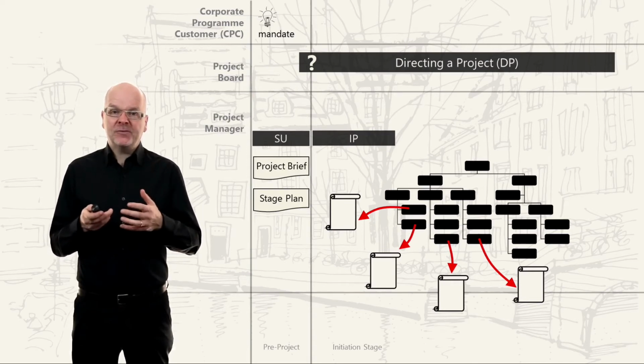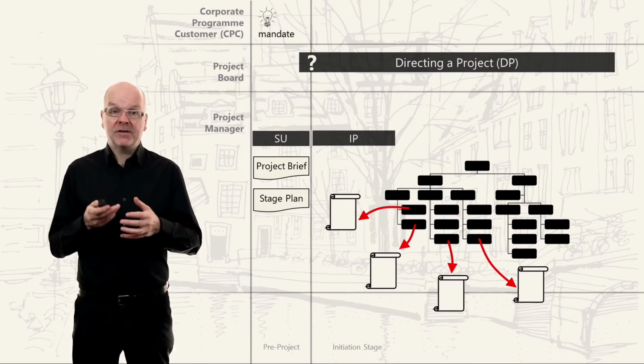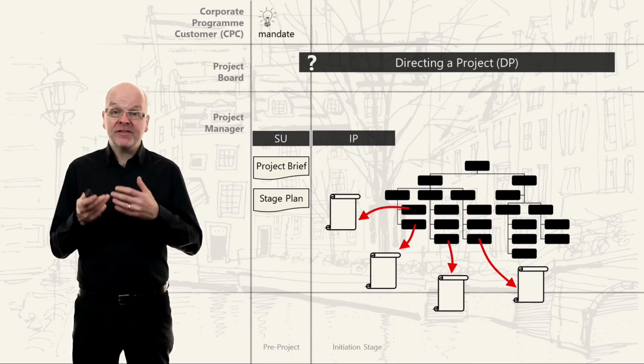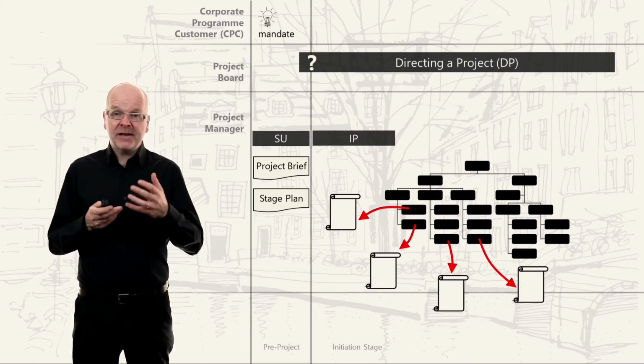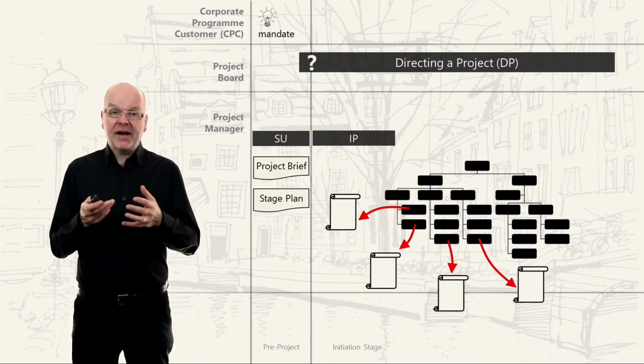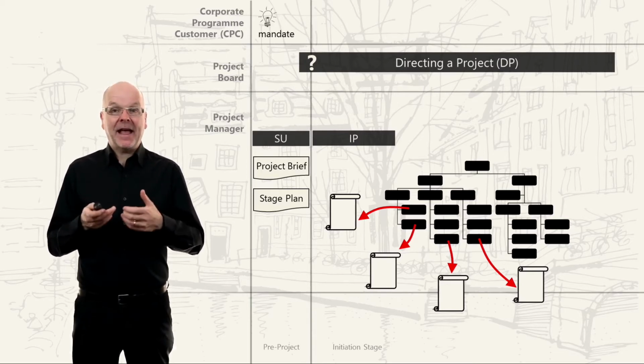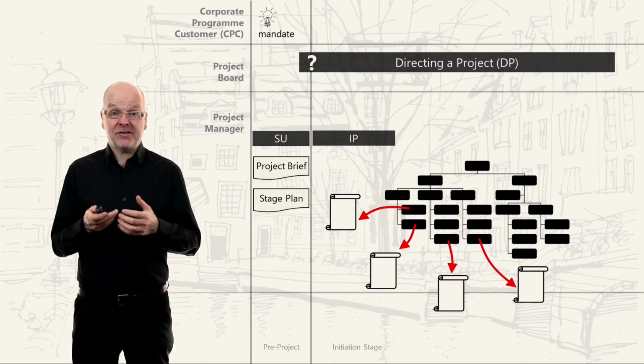The other product descriptions can be filled in later when more is known about the project and users will start to see some deliverables, so they'll get a better feeling of their own requirements. If you try to document all the requirements now, you are just guessing, and this can be very harmful and dangerous, as you will create products that nobody will use.